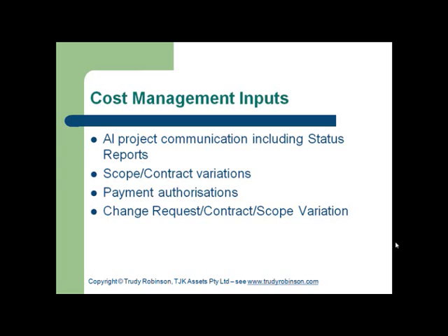Obviously, change requests, contract, scope variations are inputs to cost management as well, but that's usually via the budget. Those changes come into the budget, the work breakdown structure or Gantt is all changed, and then the cost management is the ongoing management of those changes.